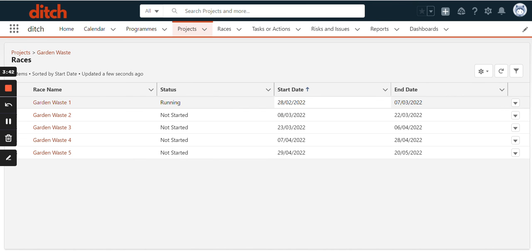I don't think any of these are actually the same length, but it enables you to look at the resourcing you've got across the organisation and say, right, we'll do a shorter one here because of what we're working on, or because of who's available to talk to us and work with us, or we'll do some longer ones in the background. So complete flexibility over the races, but it's a simple way of breaking your project down into manageable time boxes that you can add all your tasks into.